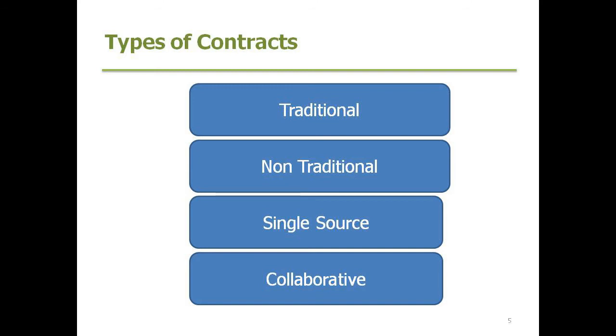And collaborative is where you have a partnering, a joint venture, or alliancing agreement to get a project forward to completion. And this is generally for much larger projects, and it involves not just the design, not just the build, but also the equity and financing, and there's also now shared ownership in this as well, where the builder actually buys into the development, and these are very large projects.